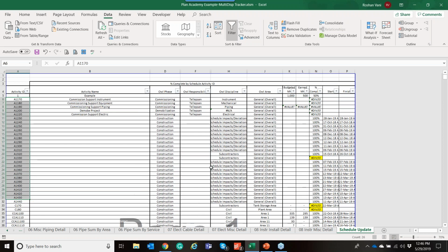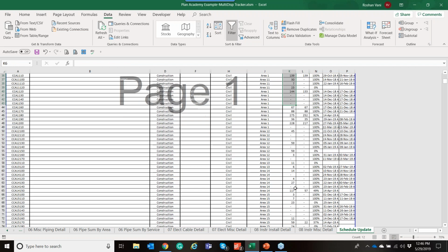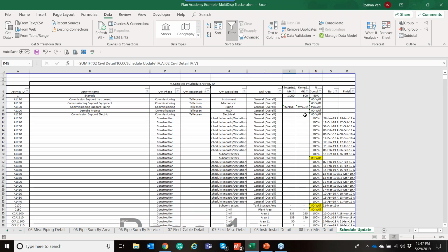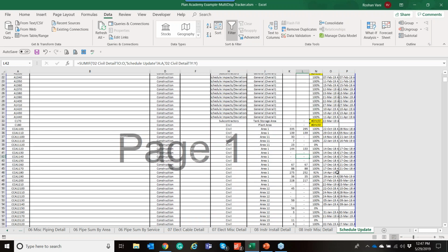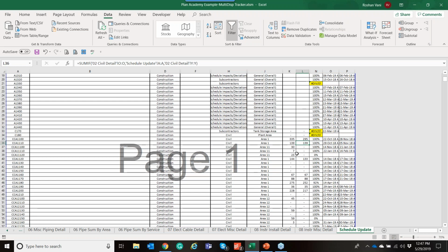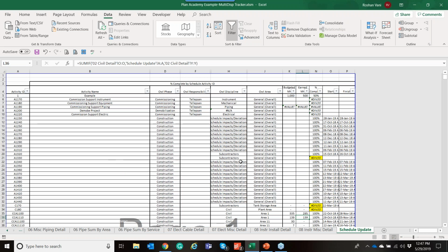And then the schedule IDs are then pulling in the total number of hours, and you're seeing these complicated sum ifs. You're also seeing the earned man hours, and you're seeing how you're rolling up from a detailed tracker back up into these detailed summary sheets.